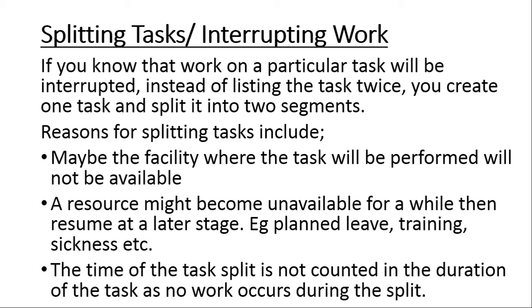The other reason for splitting a task could be the fact that a resource might become unavailable for a while and then resume at a later stage. For example, a person might have a planned leave. In other words, you are scheduled to go on leave or on training, or probably they just suddenly fell ill and they are not available for the task. So we need to shelve that task for a while and then continue it when that resource becomes available again.